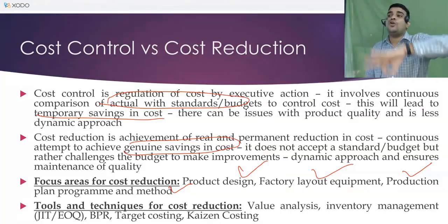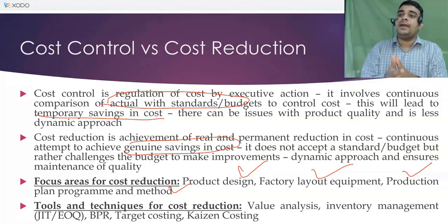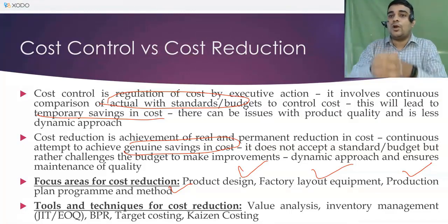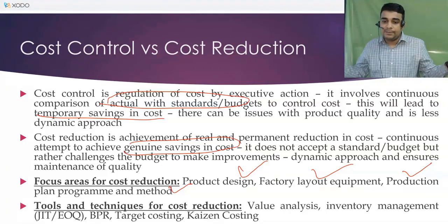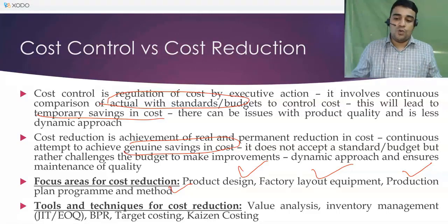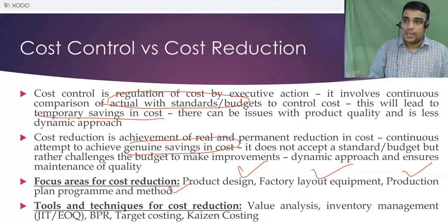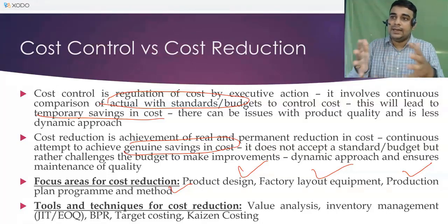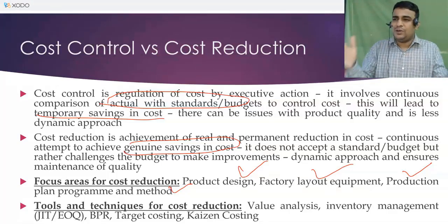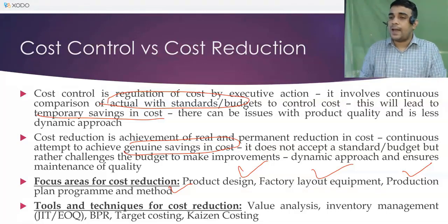So before Nano could have been manufactured, I do value analysis to understand if some of the activities are not going to add any value to the end customer. Maybe the left side mirror was not adding value. Maybe whoever is driving the car, they may feel that left side mirror is needed, but they were concluding that left side mirror was not adding value. Simple interiors could be done, simplifying the exterior. So they tried removing one wiper. So they tried doing a lot of things in order to reduce cost. So one technique is value engineering.